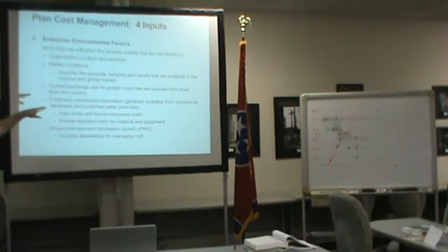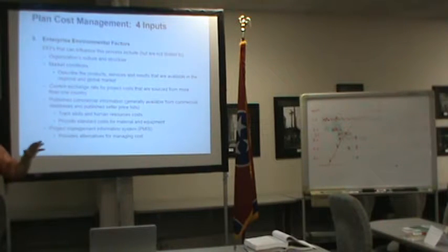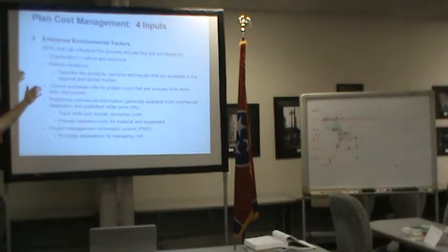All right. Current exchange rate for projects. So if we're working across countries or we're doing global projects, then exchange rates would be an EEF as we think about planning cost management, because there may be a cost associated with it. It could be positive or negative if we're talking about exchange rates, right?